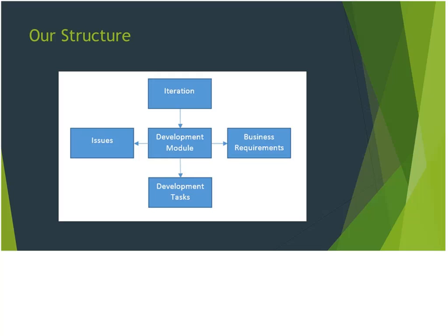So when we handed over the solution after the configuration cycle, the client wanted to know precisely which business requirements they could test at that point. But obviously some business requirements would only be met after we put in some code, some JavaScript say, or some plugins, but there were plenty which they could still test before then. So for example, if there was a requirement of creating a case, then that was one they could test straight away. Similarly, if there was one regarding building a client, they could test that. Certain security elements, so only certain people can see certain records, they could test those.